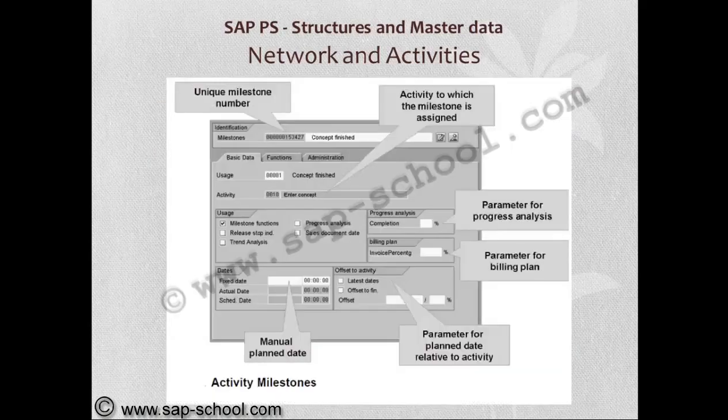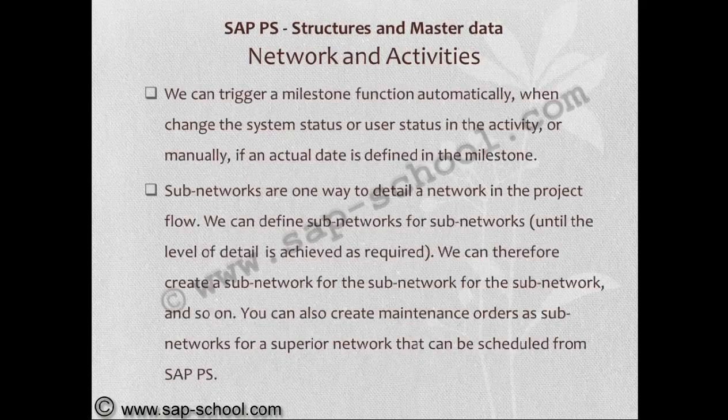If you see the activity milestone screen, we have similar functionalities as in the WBS. We can trigger a milestone function automatically when we change the system status or user status in the activity, or manually, if an actual date is defined in the milestone.